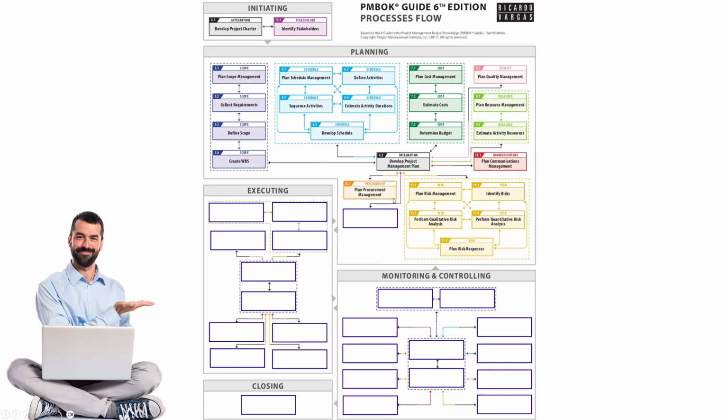What do you mean by it costs money when you plan risk? You see, if there is a risk which is likely to occur, we have to keep some reserves. So that reserve has to be in the budget. And maybe dealing with that risk will take some time. That will delay the project, so that time must also be built into our schedule. Can you give me an example?